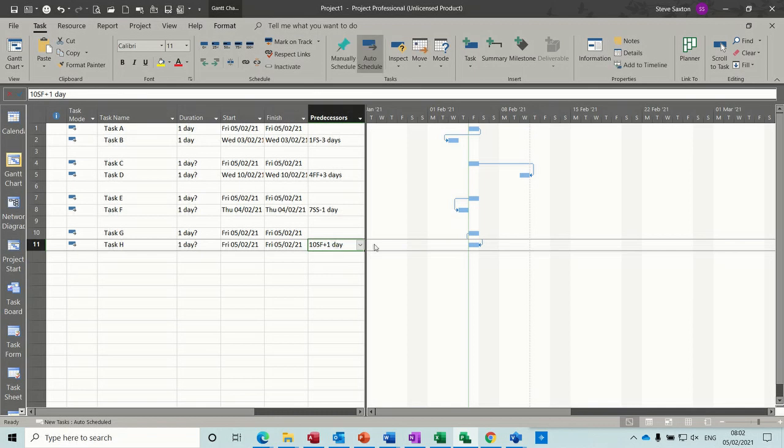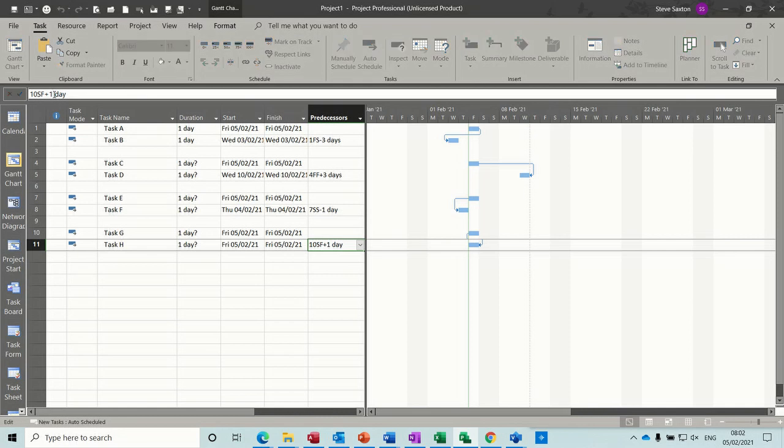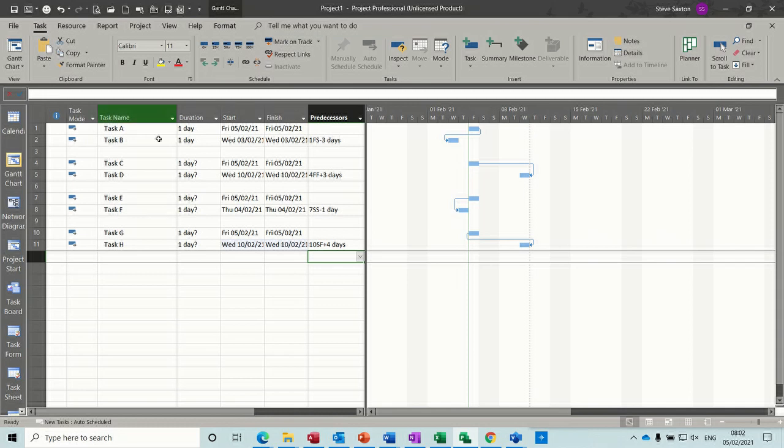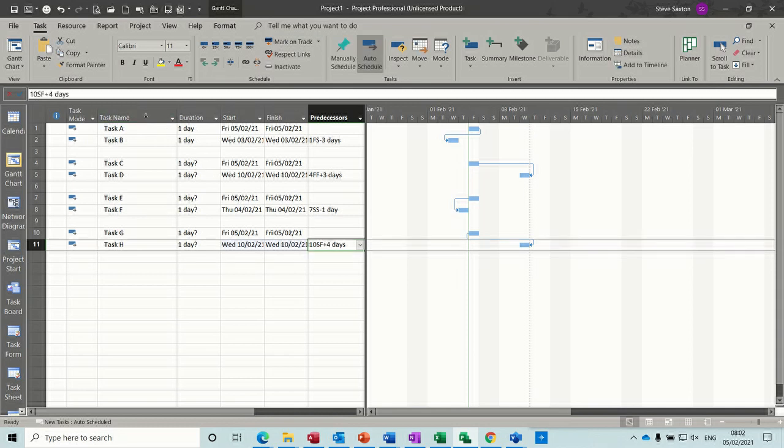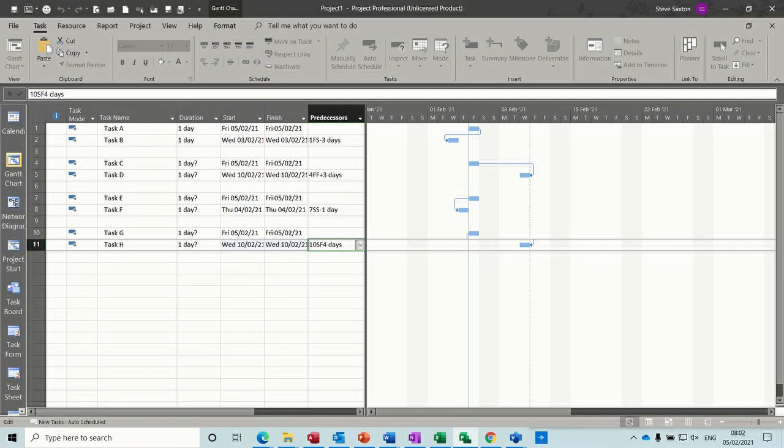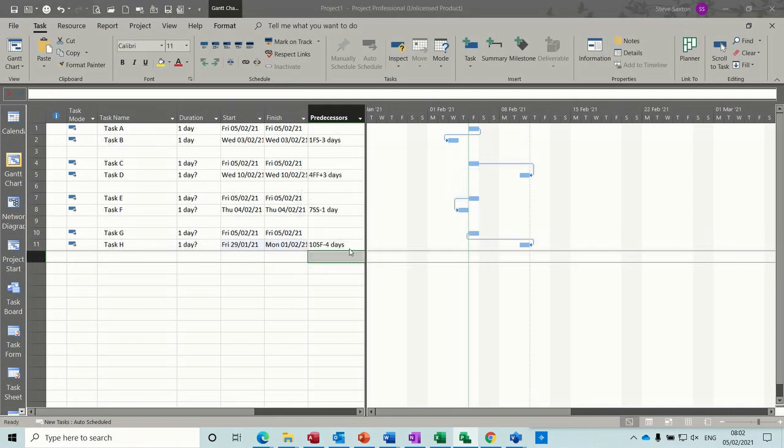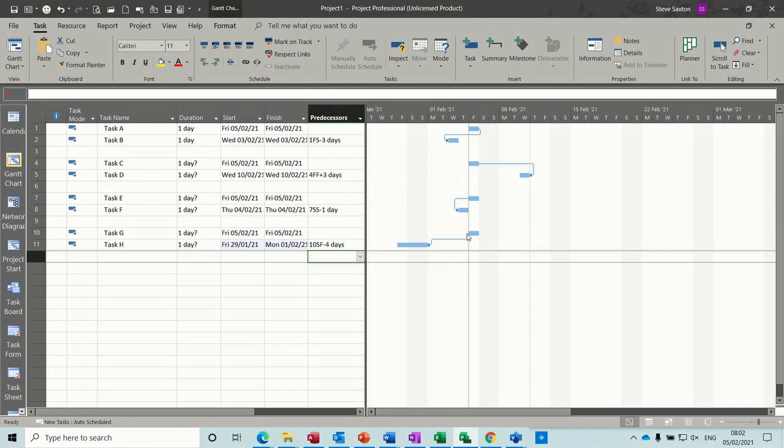So start to finish. So this task, the start of this, dictates when that finishes. So if I put plus 4, you can see that. So this one would more likely have a delay on it. So if I put a lead on it, I'll put minus 4. It's going back in time, minus 4 days. So it's just basically a plus or minus on the link that gives you the lead or the lag.